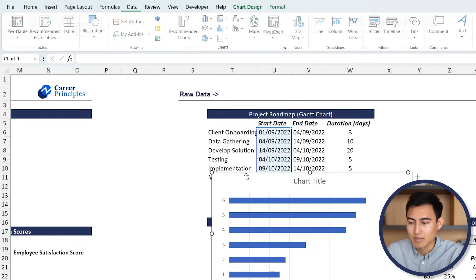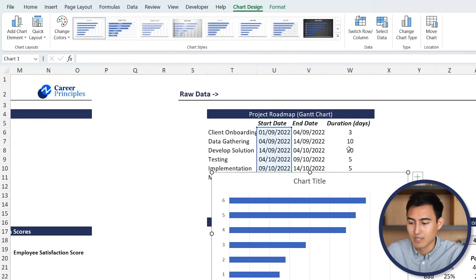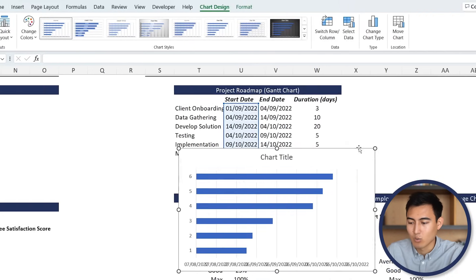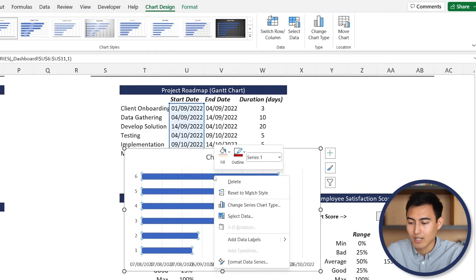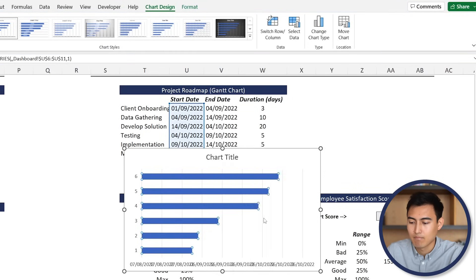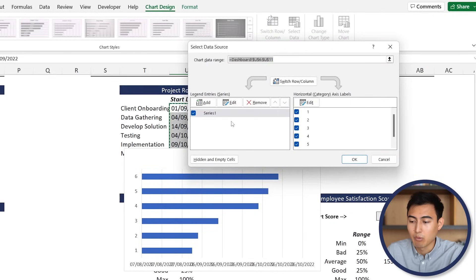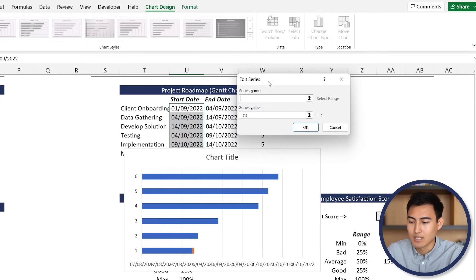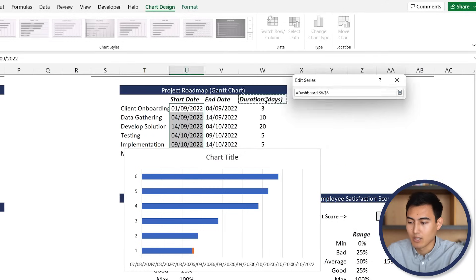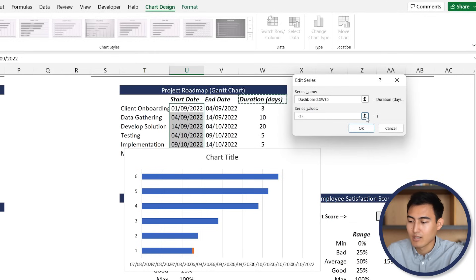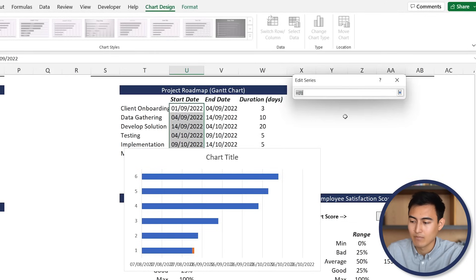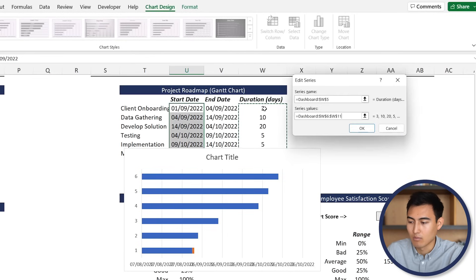Right now we're missing all of the duration, which is going to be the part to the side. To add that, right-click on the chart, go to Select Data, and we want to add a new series. Hit Add, and the series name is going to be Duration Days. For the values, just select all of them using Control + Shift + Down all the way to the bottom and hit OK.